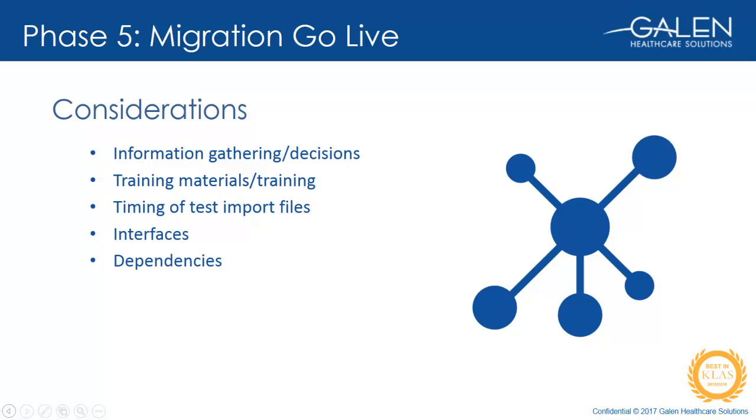Many issues uncovered have the potential to impact planning for go-live and the training leading up to that. For example, we determined that smoking status and family history problem entries in the legacy EHR could not be mapped over to MU-compliant first-degree family history and the correlating smoking statuses in the target environment. So one of the training issues that came out of that was to make sure that the client included in their training a portion for pre-appointment chart review, to transition any conversion smoking statuses to the MU-compliant entries, and then also make sure that the family history was documented with the first-degree relative correlation.